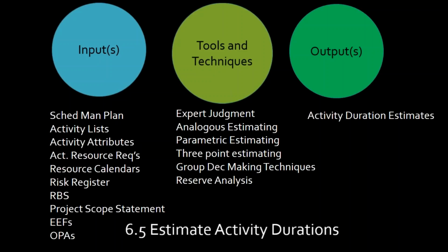Remember I said earlier in the lecture, when would I know that I've sufficiently planned enough? One of the indicators is my estimates are getting tighter and tighter to a tolerance that I can live with, plus or minus 10% on either side, whatever we've decided. Once we've narrowed our estimates down into that range, we're good to go. Let's take this project into execution. This is what I mean by progressive elaboration. It's a great example of how, round after round, our estimates get tighter and tighter to a point where we're ready to say, I feel pretty comfortable that that's a correct estimate and we can take it into battle, okay?